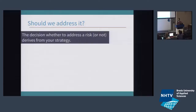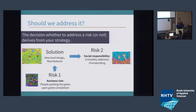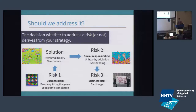Depending on your strategy, you will make a decision whether to address the risk or not. Say you have a business risk: people quitting the game upon completion. You might have a solution — create extra content, DLC packages. This might have an extra risk that your game is so addictive that people overspend or play it too much, which is a business risk of bad image. So blindly going for a solution might work your hand into creating another risk.